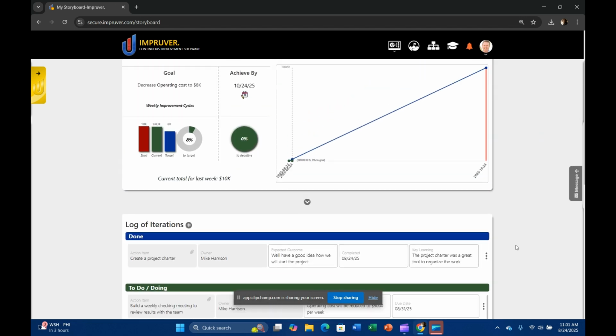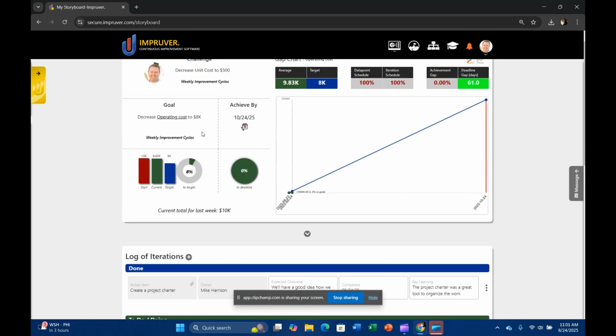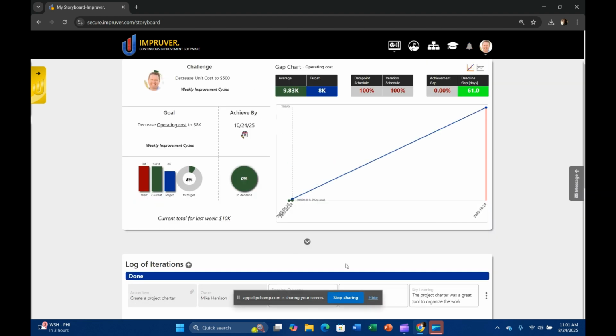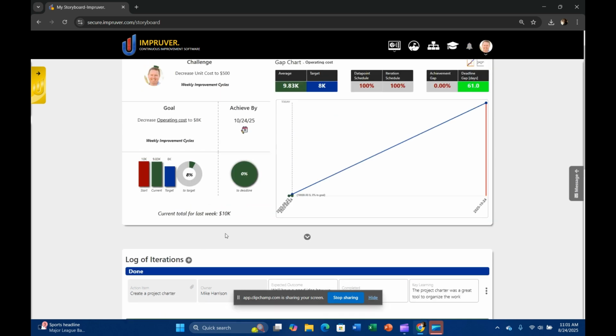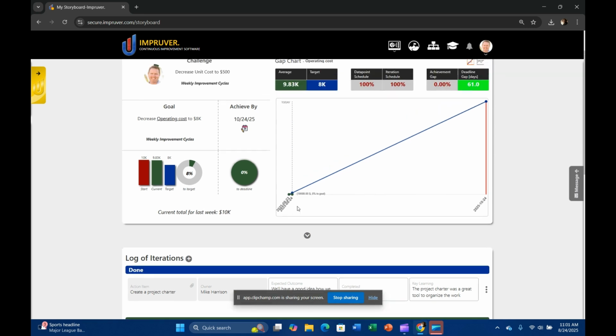The idea is that you would repeat these PDCA cycles every single week, right? You can see how the plan is right here to complete this action, and it's got the expected outcome. You've got kind of a hypothesis built in there. The do is to complete this, actually get it done. The check is, hey, did we make any progress toward our goal? Are we succeeding? Are we failing, et cetera? And then the act is, okay, let's decide the next action, right?